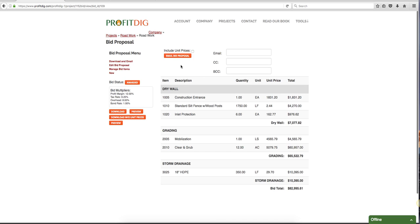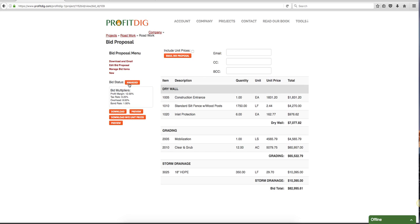Now you'll notice there's nothing else I can do with this proposal and the reason for that is because it's an awarded status. Once a bid is an awarded status you don't want to go back, because I've already logged time on this. If I were to go in and make any changes gonna throw my numbers off and everything's irrelevant at that point. I don't even need ProfitDig, I don't need anything at that point because I have no idea where I'm at on the job. So that's why it's important to prevent you from making any changes once something has been awarded.